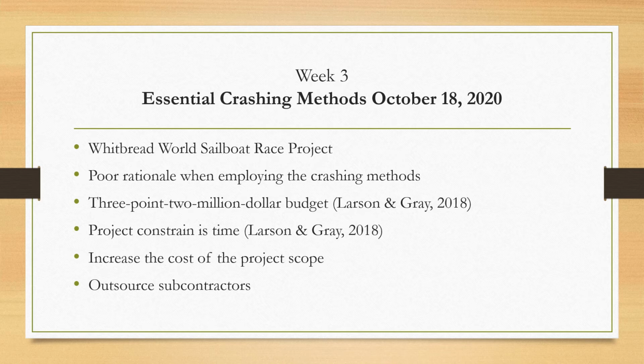Although it will increase the project cost, a critical element for the project manager to consider will be to outsource subcontractors to complete some activities. Subcontracting asserts in completing the activities sooner and free up resources that can be assigned to those critical activities, which is essential in shortening the project duration, thus alleviating the time constraint to complete the project.